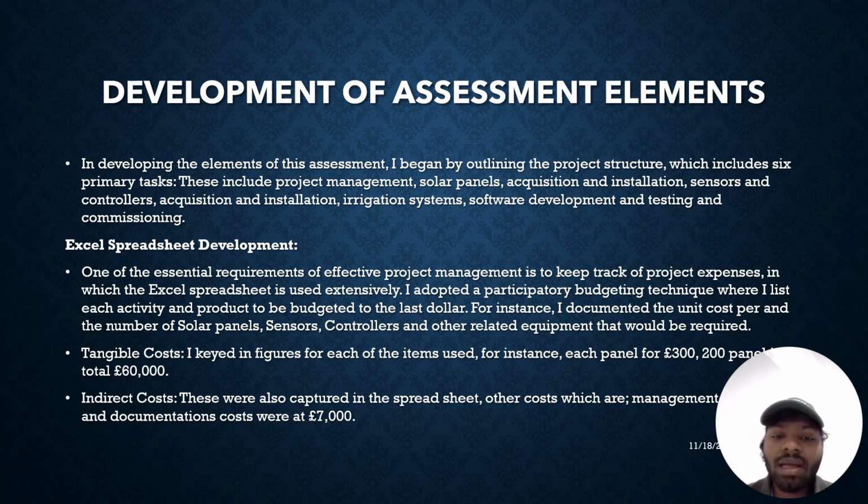After that, I adopted participatory budgeting techniques where I listed each activity and product to be budgeted to the last dollar. For instance, I documented the unit cost per hour and the number of solar panels, sensors, controllers, and other related equipment that would be required.